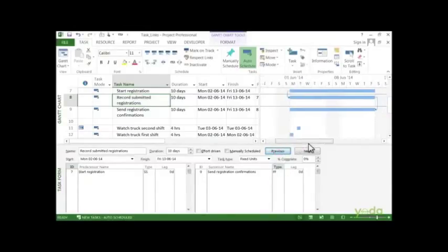So here when you say finish to finish, it will create a link between the two tasks with a link on the right hand side. Well, the fourth type is start to finish. And it's kind of confusing, so it's really good that it doesn't happen very often. What this says is that the start of one task controls the finish of another. So it really puts the whole timing thing completely opposite of what you expect. So let's see an example of this one.